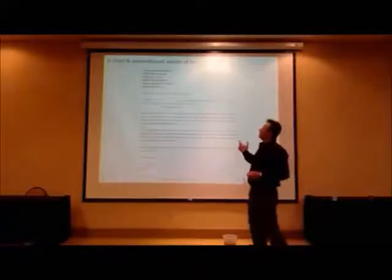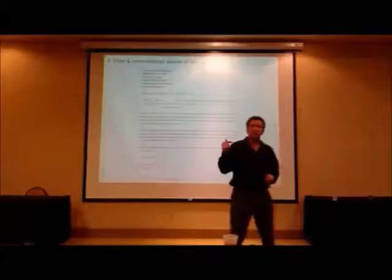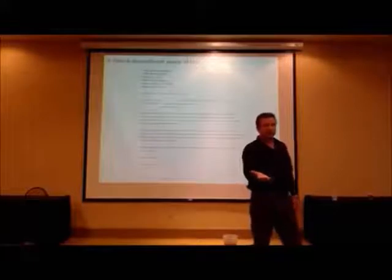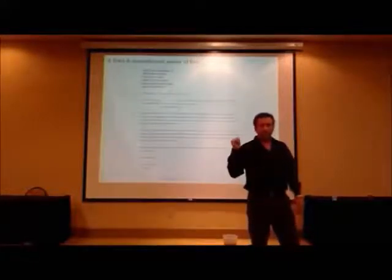The final unconditional waiver of lien, this is what you get him to sign when he's finished the project and he has his hand out for that final draw. You do not give him that check until he signs that unconditional waiver of liens.